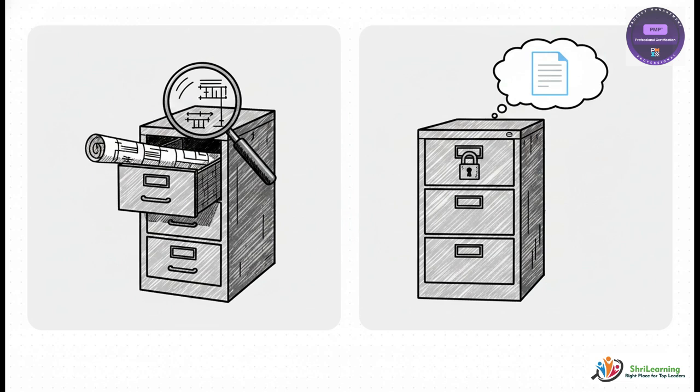There is a very strict, very critical distinction in project management between project management plan components and project documents. They are completely different things. Requirements documentation is a project document. It is not a component of the project management plan. So when the prompt says the PM reviewed the plan, it's secretly telling us they haven't touched the project documents yet. They're sitting in a totally different filing cabinet, completely unread.